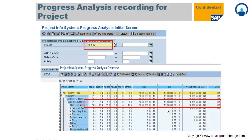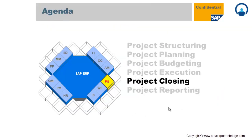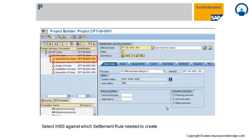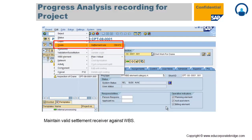Finally, project closing is done in two ways: financial closing and technical closing. Financial closing refers to settlement of the project, and technical closing refers to status-based closure. You select the appropriate WBS element, first maintain the settlement rule, and then proceed with the closing process.